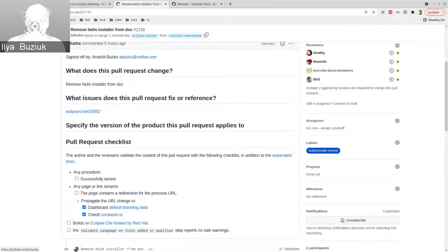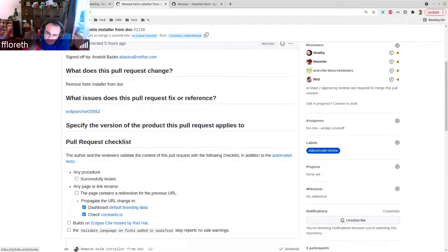Yes, but it will help us not start to work on something at the same time some engineer is working on the same topic, and to avoid conflicting pull requests. That happened for the backup, for example, where we had one pull request coming with a few changes, and at exactly the same time we had one writer working on the same topic who didn't notice the pull request. So I'm sorry for that.